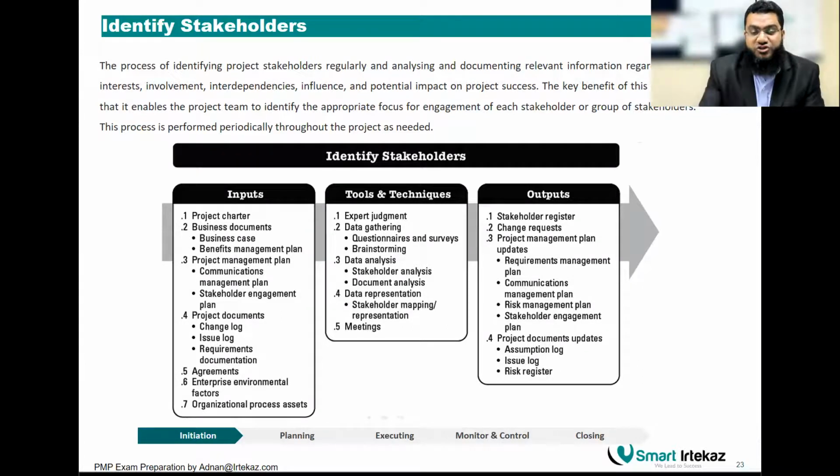Maybe he already mentioned that the quality manager will be, for example, let's say Khalid, right? So now Khalid is going to be another stakeholder because his name is mentioned there. So just like this, you may identify different stakeholders through your project charter and any other document analysis that you have to do. Like if you have agreements, go through the agreement. Some of those people, they're also part of your stakeholders.